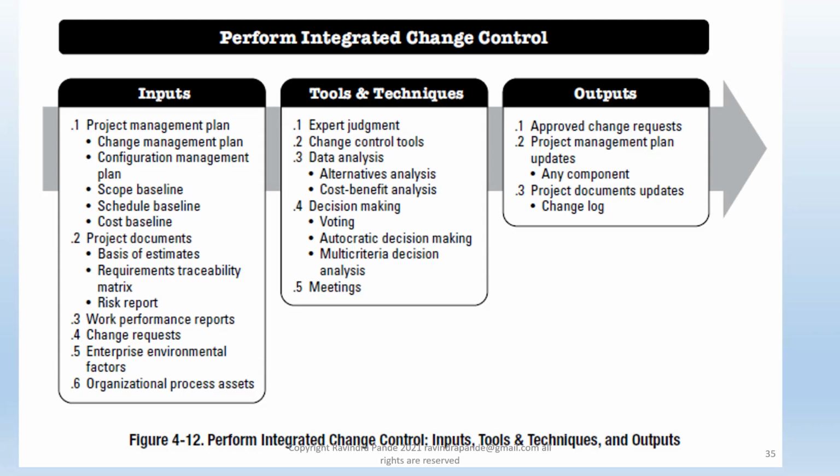In the plan acceptance, we might allocate a schedule to it in terms of project manager. The last stage is totally the project manager's responsibility when it comes to an accepted change. When it comes to an approved or sanctioned change, it can be done by the client, by the change control board, or some nominated person working as a change control board. And this is how we continuously keep performing integrated change control in a step-by-step manner throughout our project. Does anybody have any question on the change control board, performing integrated change control?